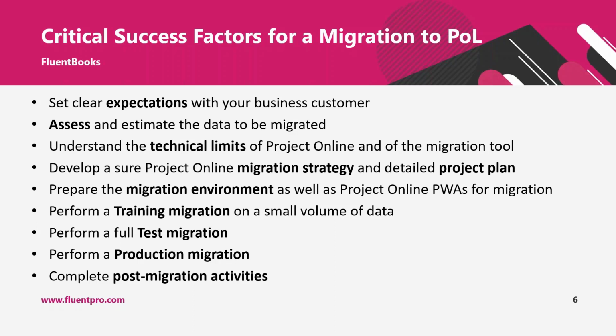Which basically means that it is necessary to spend enough time on assessment of the data that you're going to migrate, on planning and tests before you actually commit to a delivery date for a completed Project Online migration. Because sometimes technically migration can be more complex than it looks from the first sight. Assessing and estimating the data to be migrated is also very important because the duration of migration depends on the quantity of data that you're going to migrate.